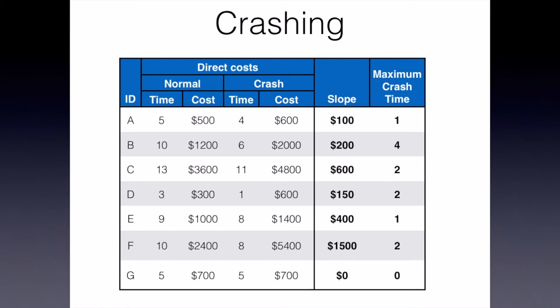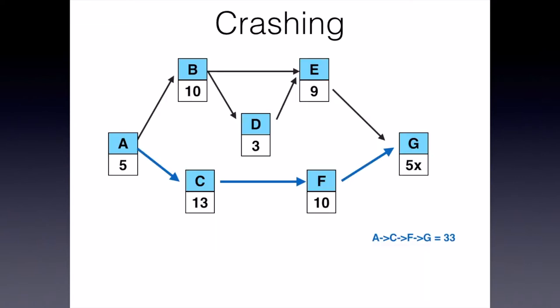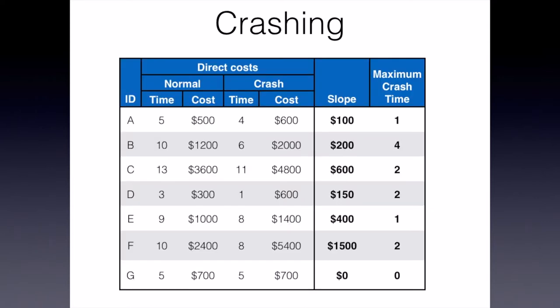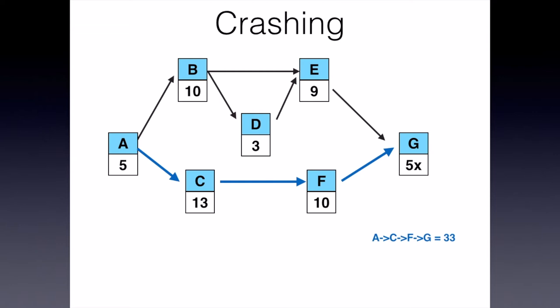If we now look at these tasks in our project network, I've put out the relationships — these are all simple finish-to-start relationships for this example — and put their durations in the box underneath the task ID. You'll notice for task G I have a notation of 5x, because we cannot crash or reduce this anymore. I want to put some sort of notation, either when I've crashed something once and could only crash it once, or when it is not crashable at all — I'll put that little x after the duration to indicate you cannot consider this any longer for reducing the project time.